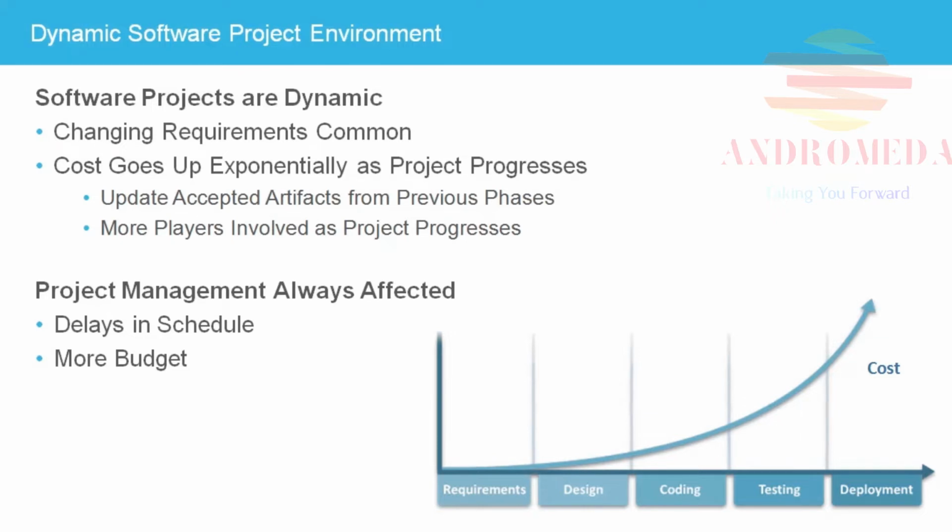Software is especially expensive to modify. If a software design does not satisfy its requirements, it is easy to fix while in the design stage, when all that needs updating is the design diagrams and document. However, if the error is not realized until the software components are being integrated, then unit-tested code must be modified along with the unit tests. This could include modules that interface with the defective code, causing work to halt until the rework is complete.